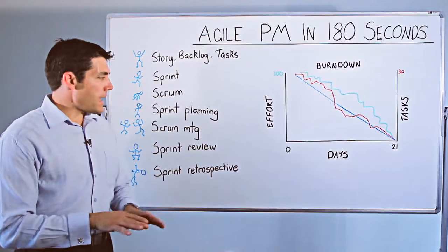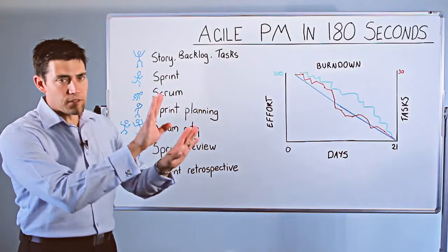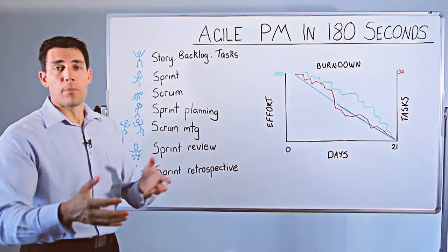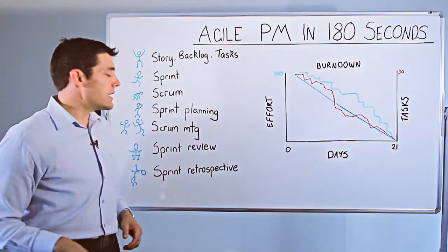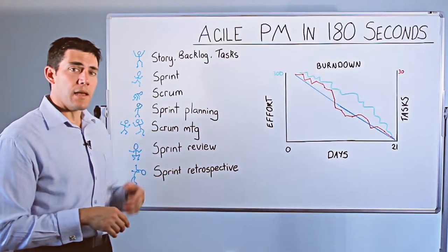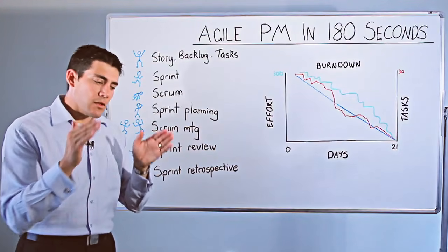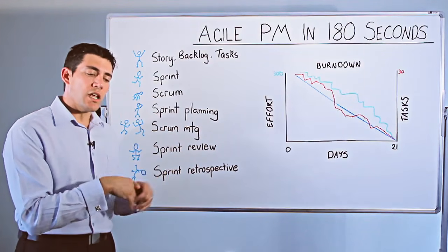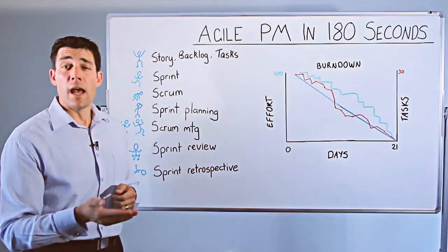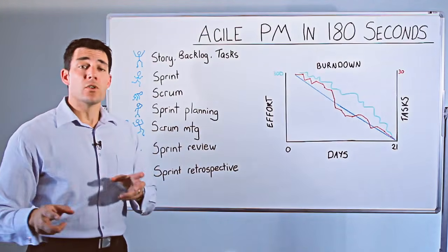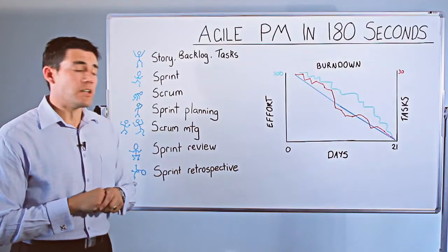A lot of Agile project managers put the list of tasks that need to be accomplished on a board somewhere, organized by person or organized by functionality. It's really up to you how you organize that, but it's important that the team keeps a constant focus on what they're doing, and thinks about what they need to achieve and what might be going their way. In that Scrum meeting, they talk about obstacles and who can help whom, and they do that coordination.